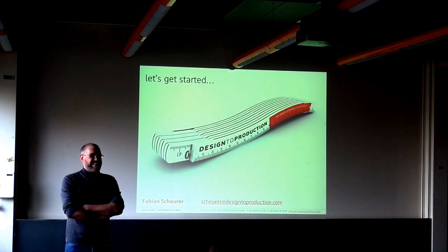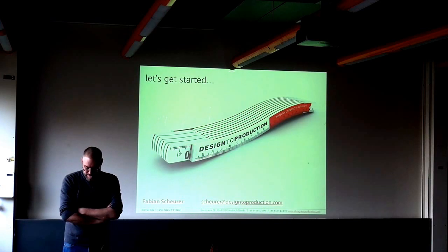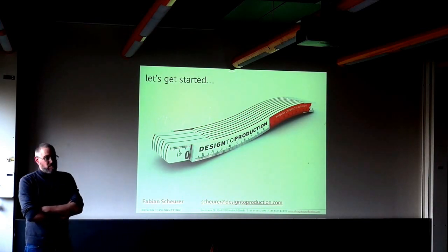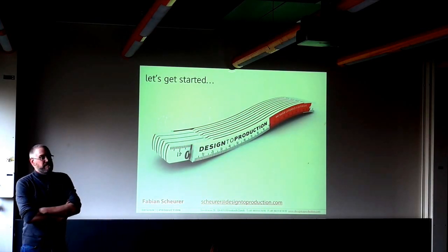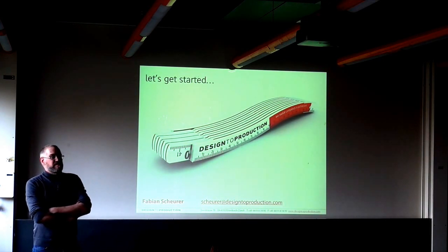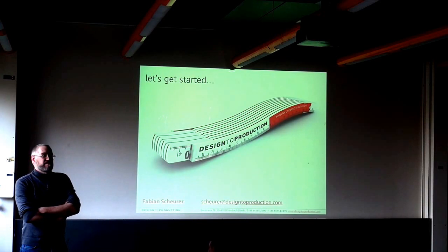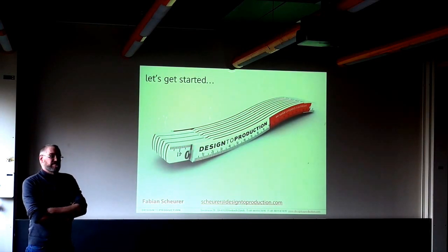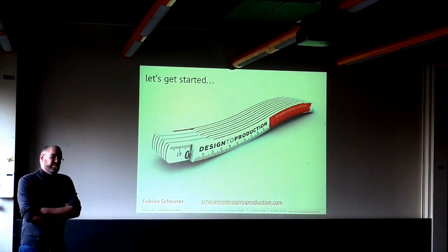Increasing because of the lifespan of the project. Investments are growing through the lifespan, so at the beginning there is a very low budget, and then more and more is invested, construction-wise. But the more you make design changes through the lifespan, the more expensive and costly it is on site.